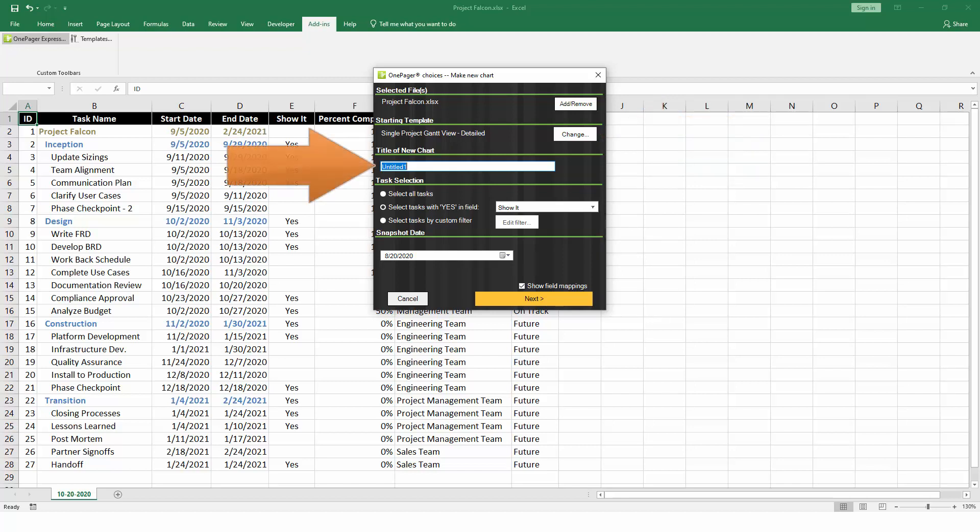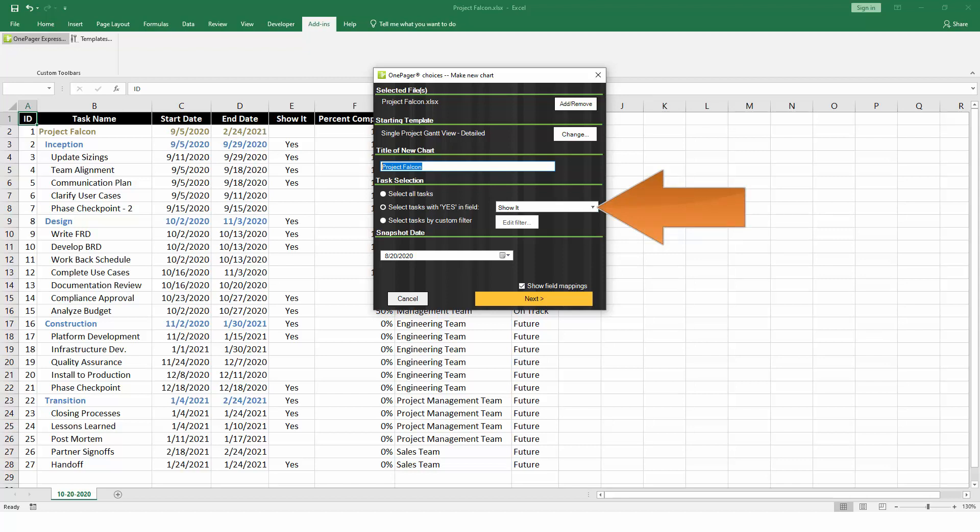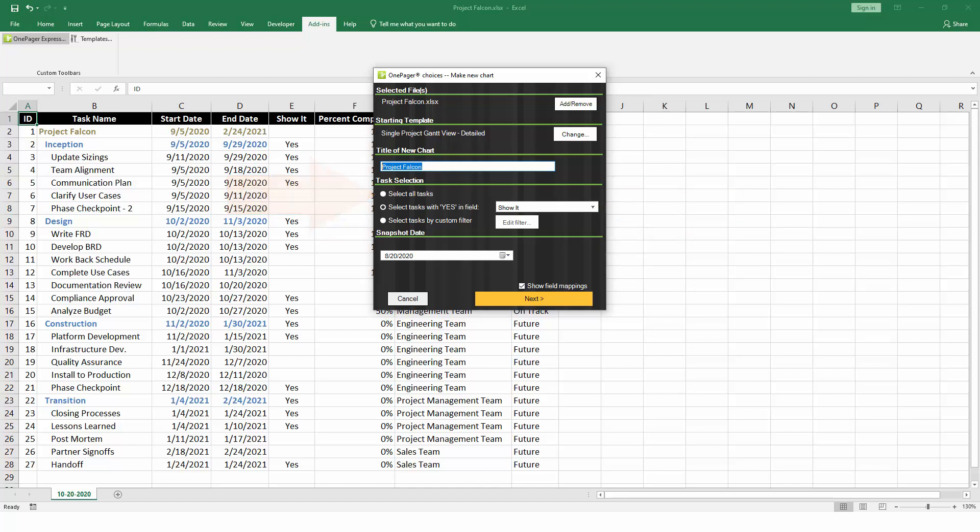Give your chart a title, which will be the name of your file when you save it. This section allows you to control which tasks and milestones from your project plan should be included in your OnePager chart. We've already set up a Yes-No field back in Excel, so we can leave that selected for a faster filtering option. For a simpler project, you could also just choose to bring in everything from Excel without filtering.